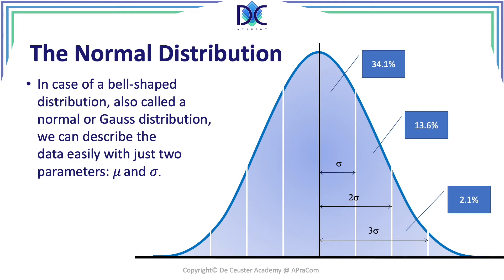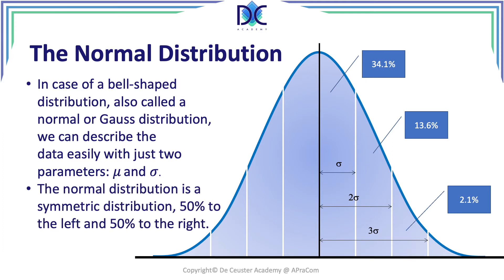What you see here is a symmetrical distribution. It means that the surface to the left and to the right of the average is exactly 50%. We have the average as the black line, and then three intervals, each one sigma further to the left or to the right. Between the average and one standard deviation we find 34.1 percent.